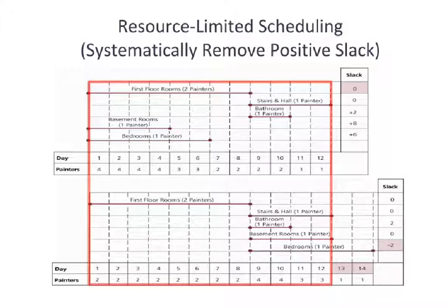So we're using our only 2 painters available on that critical path item for days 1 through 8. So everything needs to shift until after day 8. Now, in the process of shifting, you'll notice that since the bedrooms take 6 days and we can't start them until after day 8, we have now extended the duration of our project already by 2 days. So now we have 2 days of negative slack on the bedroom. And we still have a problem.